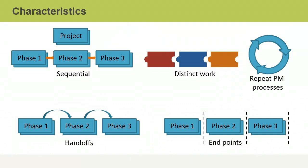A simple project can include just one phase, while a complex project requires a lot of time and planning. For instance, if you are creating a mobile game, you may want to break up the project into several phases including design, development, testing, and release. This makes it easier to break up all the work required for a complex project.